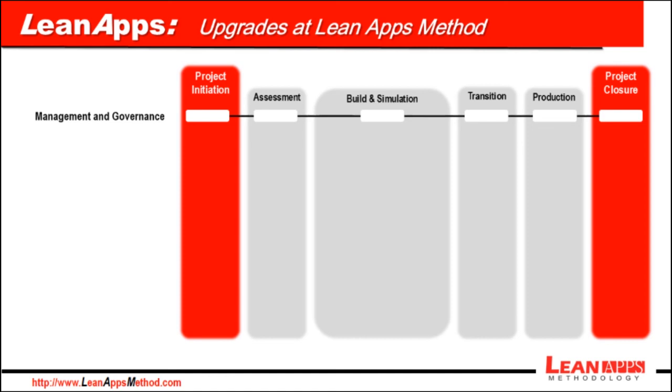First real process is the functional and technical analysis, which includes the architecture and capacity plan required for the new version, the functional analysis related to version changes, and analysis required for the customization updates. This process is expected to be performed in the first phase.